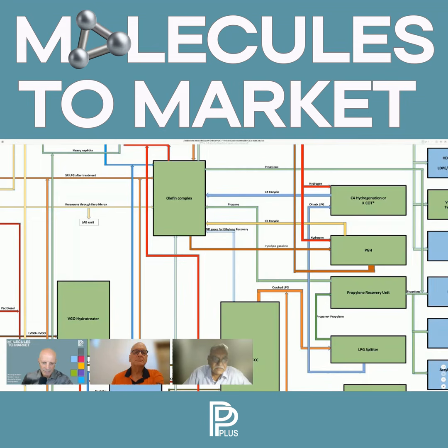So in that process, you are able to start early. There is no need for a FEED, no need for a FEED award. So there is a lot of saving of time. And you work on an EPC basis. That means the owner will get the recommendation. The contractor will place all the orders, but transparently he will hand over all the commercial files to the owner. That's a regulation. Now, for that to happen, since the contractor has rendered all the services, the contractor will be paid a certain fee by the owner.